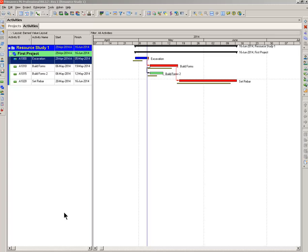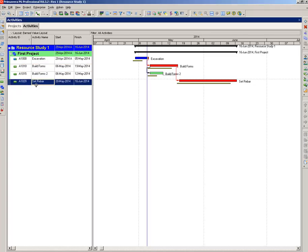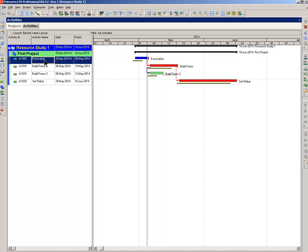Sample project: excavation, build forms, build forms two, set rebar. The colors of the bars are what everybody's used to. Blue for the work done, red for critical remaining, green for non-critical remaining work. Yellow bars are the project baseline.